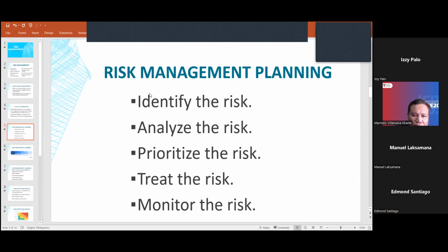Once we identify and analyze, we need to understand the risk and decide what would be the first priority or the last priority. When we begin the prioritization, we need to rank each risk by factoring in both its likelihood of happening and its potential effect on the project. This step gives you a holistic view of the project at hand, and we can pinpoint where the team must focus in terms of that risk.